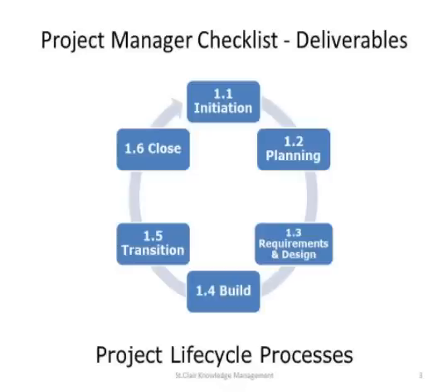Once you've got those listed out, the next step is to look at, for each of these requirements, for each of these needs, what sort of project deliverables are required. Now, these deliverables could be systems, it could be documents, it could be reports. Okay, so you've got a need, you've now got a list of deliverables, and the final step is what activities and tasks do I need to do to create those deliverables.